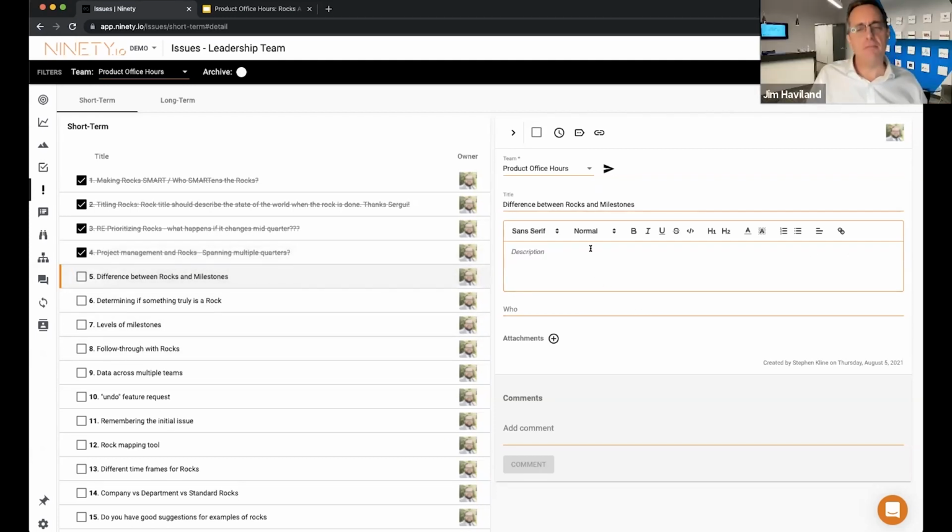Yeah, but phased rocks, genius, great way to go. And like I said, if you're 6 weeks in and realize, hey, this rock is too big for this quarter, I need to break it into 2 phases, get everyone's agreement, and then go, man, go.